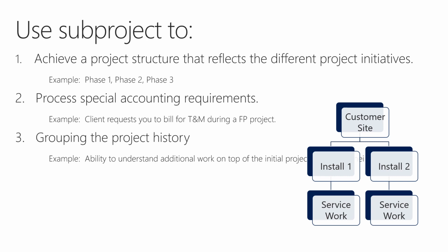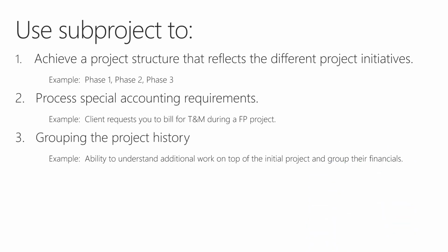And then anytime you're servicing that, you could have a time and material type project to track all the service towards each job. You can get a composite overview of all the costs and revenue from each project at the top level, or you can break it down at any of the sub-project levels to understand the specific work and what type of work at each sub-level. All right, so those are some scenarios when you can use sub-projects.